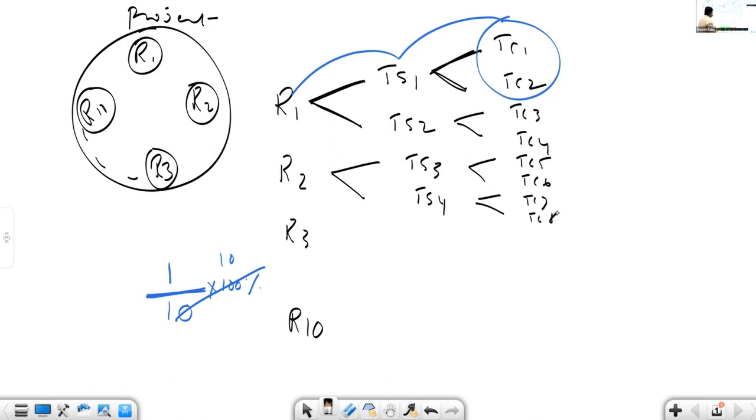Now I consider 20% of the test case coverage is achieved, still 80% of the work is pending. These I have to update to my next level. In order to track for how many requirements test cases are covered, to be covered, the RTM document is helpful for the management. That is one advantage. To track the percentage of test coverage, the RTM document is helpful for the team lead level, manager level. What are the other advantages?